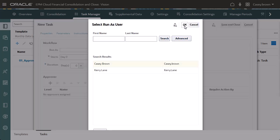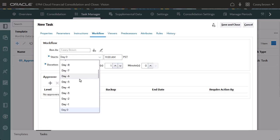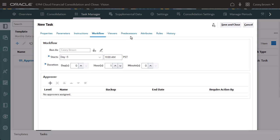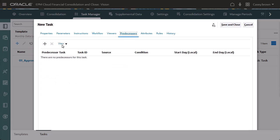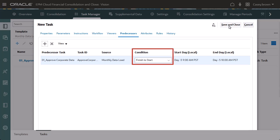The Run As user must authorize the task before it will execute. I want this task to run as soon as the approved corporate data task is completed, so I'll assign the same start day, and then I'll add the approved corporate data task as a predecessor with the Finish to start option. I'm finished setting up this task, so I'll click Save and Close.